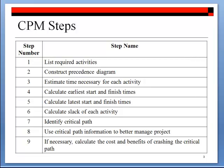In step one, all the required activities in the project are listed. More importantly, the interdependencies among these activities are identified by determining the immediate predecessors of each activity. Throughout the rest of this supplement, we assume that step one is already completed, and we'll focus on steps two through seven listed in this figure. We'll exemplify how CPM works in the following slides.